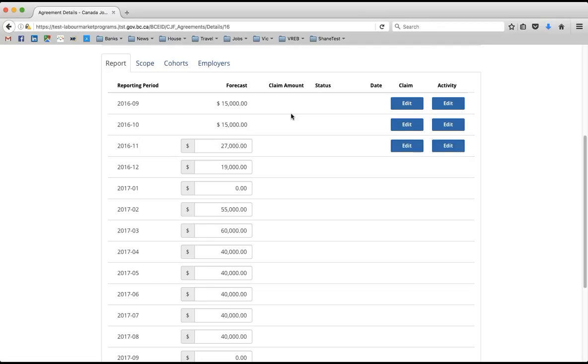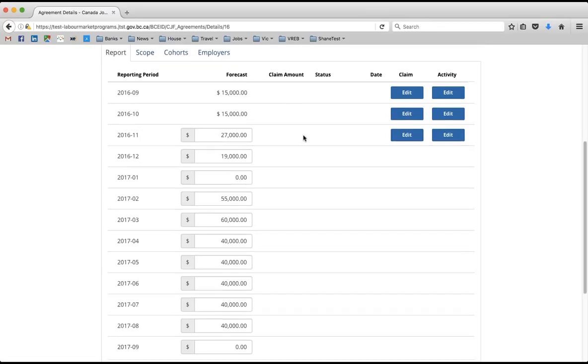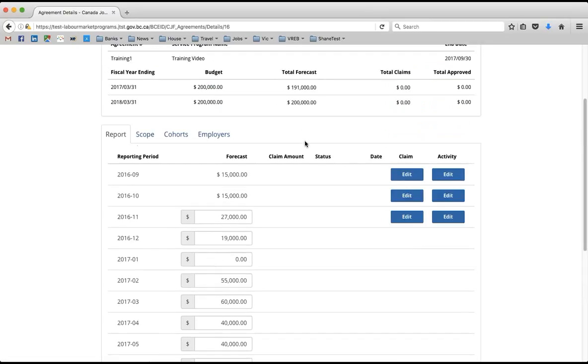So how you look at that is, if, for example, you've spent less than you anticipated that month and your actuals are less, it might be because one of your expenses has changed its timing and shifted out, so you would go and adjust your future forecast. Alternatively, you may have spent more than you expected, and you might have to refine your future forecast because of that. So that is it there.